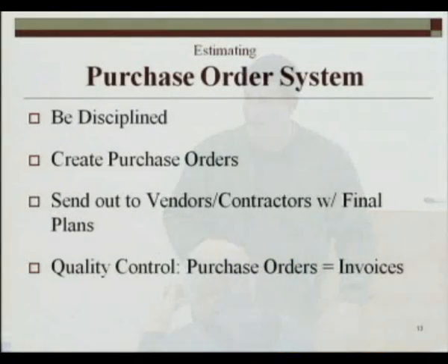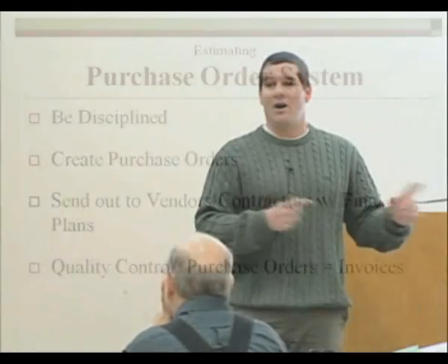How many people in here operate off of a purchase order system? It's really a simple thing. I know over the years I've worked for a lot of builders, some big national builders, and they have these enormous accounting systems, purchase order systems. I can't tell you the times that I've been off a job for 3 weeks, and their policy is you don't start a job without a purchase order. But they're calling you, hounding you to get on the job, so you go get on the job, and then they also say, we can't pay you unless you send the signed purchase order in. So 3 weeks after I'm done with the job, I'm trying to get a purchase order so I can get paid. And so if you use a purchase order system, be disciplined about it, okay?